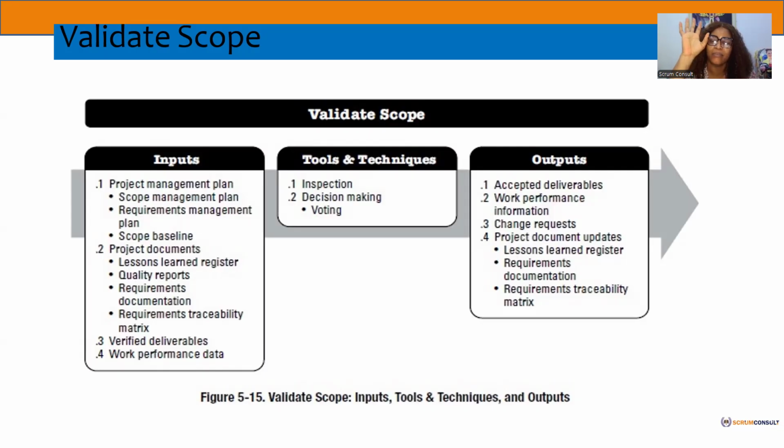What are they? Let's mention. If there's a change request, that's number one. What's the next thing? Impact assessment. Yes, thank you. Second, you look for alternatives. Thank you. Third, you go to the management board with the alternatives. Yes. Okay. The next one.